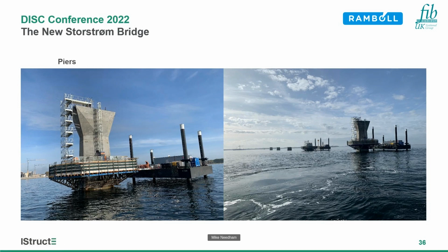Currently we've produced and installed the first 5 pier heads. 38 pier segments are produced but not necessarily in place yet. 10 pier segments are placed offshore, and we've cast 8 of the offshore stitches joining the lower pier to the upper stem.